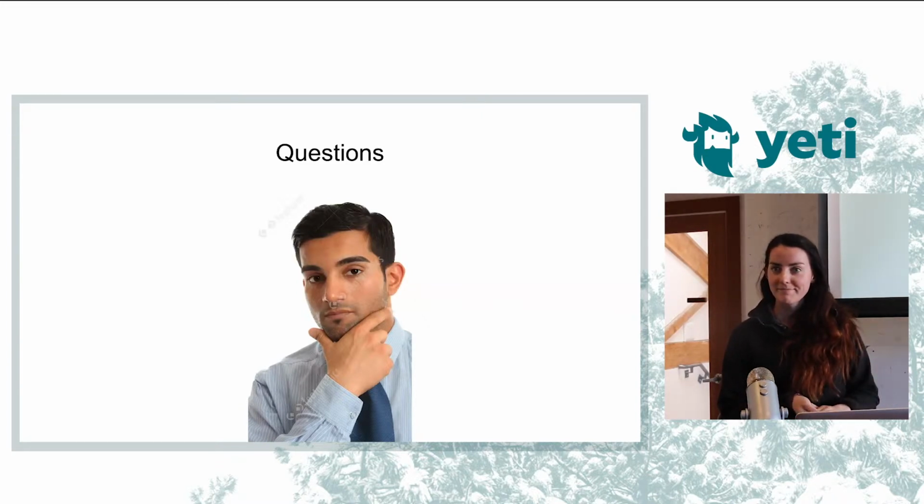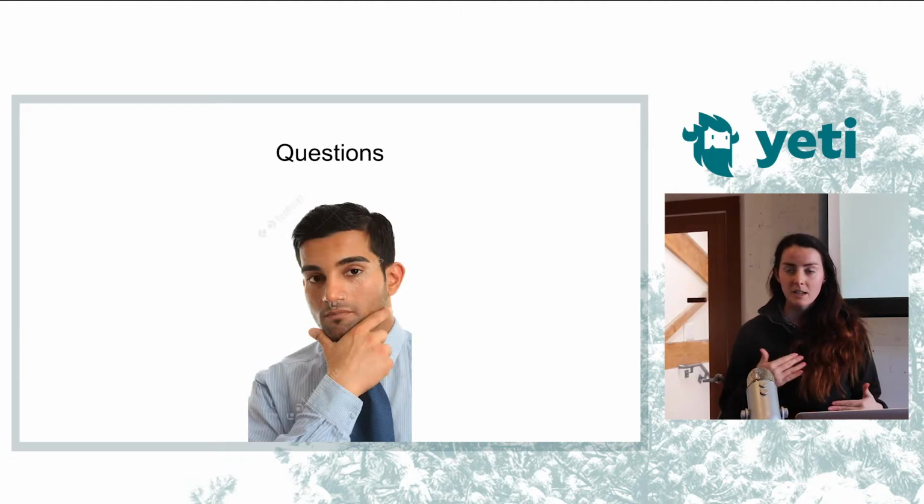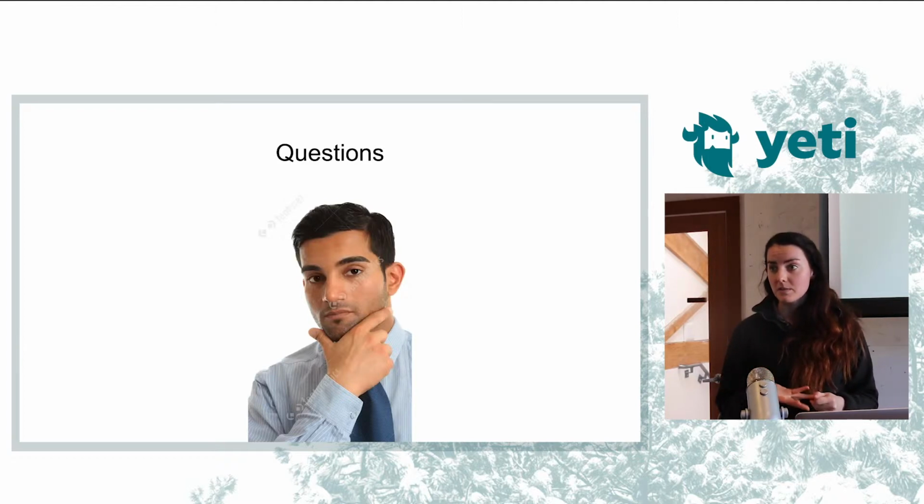Yeah, Kevin. How much more effective do you think the hour-long retros are than the shorter one, like a half an hour? I think a half an hour is just not going to be effective at all, because if you take into account everyone's going to be a few minutes late to the meeting, so say you're starting 5 minutes late, post-it generation takes everyone between 6 to 10 minutes. Then actually putting up the post-its, talking through them is another roughly 10. So then you are leaving about 30 minutes for discussion.